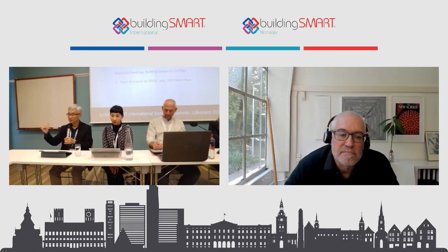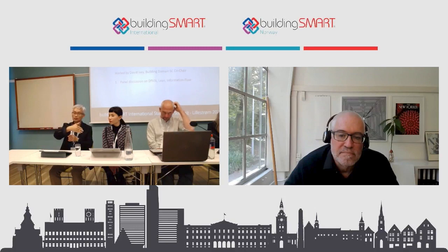And talking about resources, I think we are beginning to collect that information because all these things only happened in just a few years, right? So we are collecting a lot of information. By having the hub that Vanessa mentions, that helps to streamline the whole process. Not only do we construct the components in Singapore, sometimes it is done overseas, and then they ship it to Singapore. And this hub also acts as a logistics hub for them, so we bring it to the construction site in time for installation.